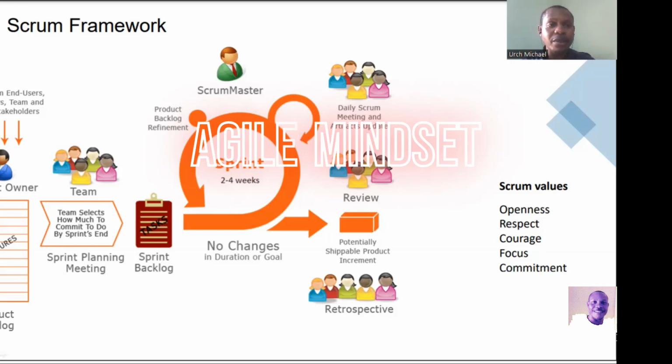If you've not forgotten, I said it's a presentation, kind of. The sprint review is a presentation where you have gotten to your final sprint, you have an increment. The box you're seeing here is a representation of an increment, a potentially shippable product increment. So when you have an increment, then you present it to your customers, to your clients. Tell them what you have done, what you've produced, a new product that came up, how it worked, point them back to the picture and the roadmap on how you began and everything. Let them see it, and then they're going to look at the increment. They will tell you, no, this is not what we're expecting. Or they will tell you, this is just what we wanted.